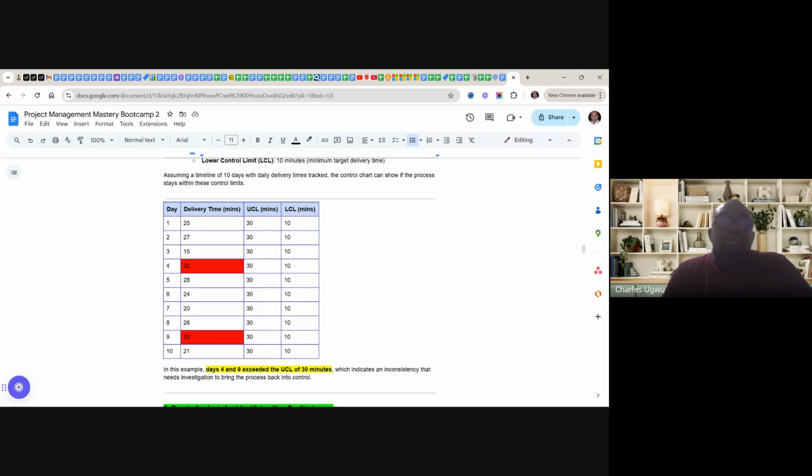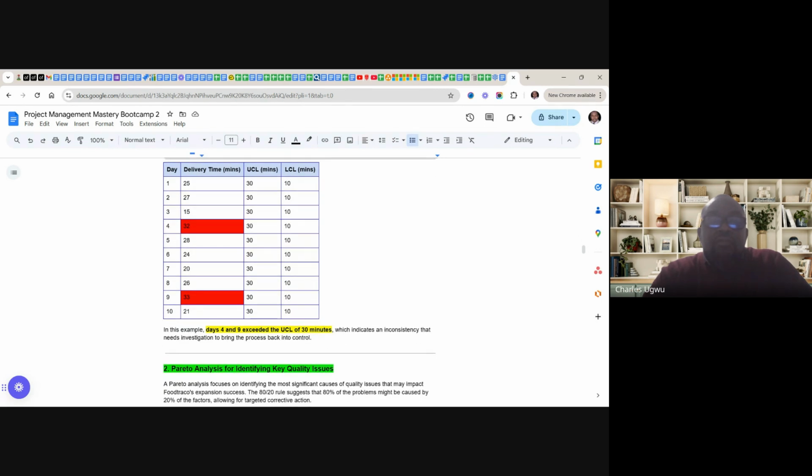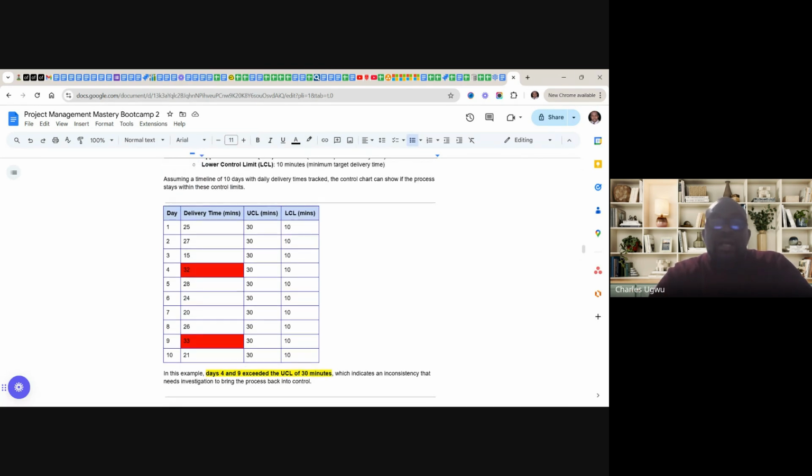So this is captured. We need to know why. As a quality assurance and control manager, then on the 5th day 28, on the 6th day 24, on the 7th day 20, 27, then on the 9th day, 33 minutes against 30. So we captured these 2 days. That is, for us, a defect, and we need to investigate to know why. So that is how you can use control charts.